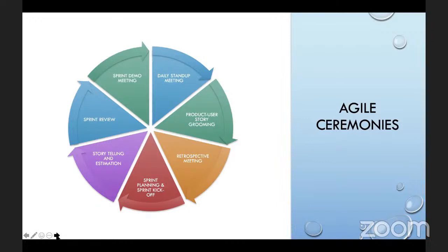When a developer says this is a 2-point story, that means it's a 2 days story, right? That means it's going to take me 2 days. This is a 3-point story. What does that translate into? It's going to be 3 days as well, right? So they will take turns, and QAs will also give their estimate that testing will also be 1 point. So that means a day. It's going to take us a day to test this story as well.